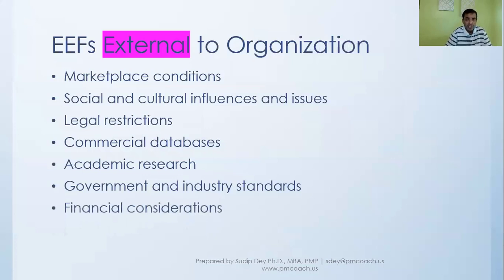Financial consideration. Things like interest rate and inflation may impact your project. For example, if you have hired a consultant from a different country and you are paying them in their local currency, then how the exchange rate fluctuates will impact your project cost.